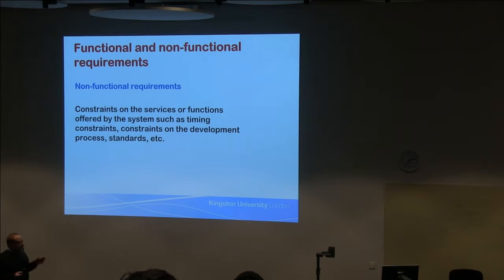The system must respond within 10 seconds when you're doing a search because Bill Bloggs in 2012 did some research and found that 70% of users navigate away from a search page if it takes more than 10 seconds to respond. That is a non-functional requirement backed up with literature. That's what you should be looking at, rather than just saying, I'll pluck a whole bunch of these out because I've got to put some in.